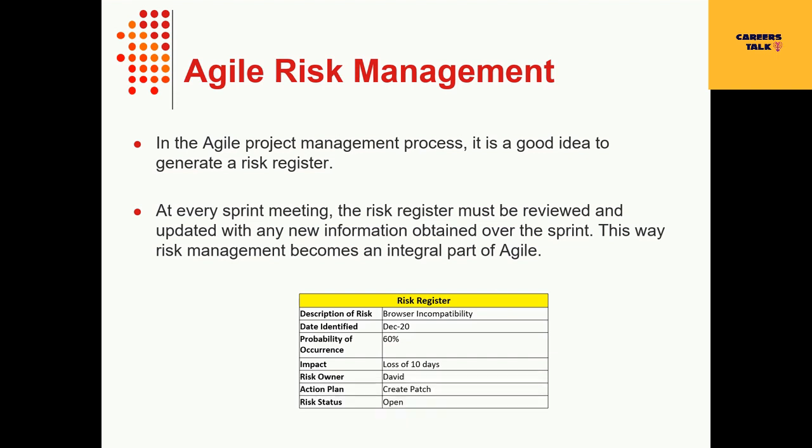In the Agile management process, it is a good idea to have a risk register. The risk register should be created during the first feature backlog discussion and updated frequently throughout more complex efforts as new risks are identified, accepted, or mitigated. This is a list of potential risks to project completion. The register should include a description of the risk, the date it was identified, the probability of the risk occurring, how severely the risk could impact the project, what action should take place, and the risk status — whether it is open or closed.